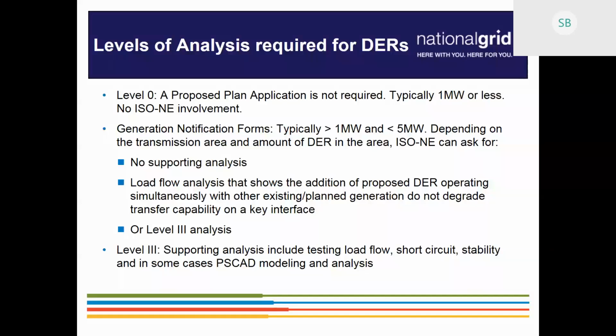Right, but there's no way to do the impact study in parallel with the transmission analysis? Could you repeat the question? What could happen is the transmission impact, if there is one, could affect that distribution. He's asking if the distribution study can go on concurrently with the transmission review. And John Kennedy's answering the question, which says essentially, until we know what the transmission impact is, we don't know where we're going to plug you in. So we could do a distribution impact study, but if where we did it doesn't work, we have to move someplace else.